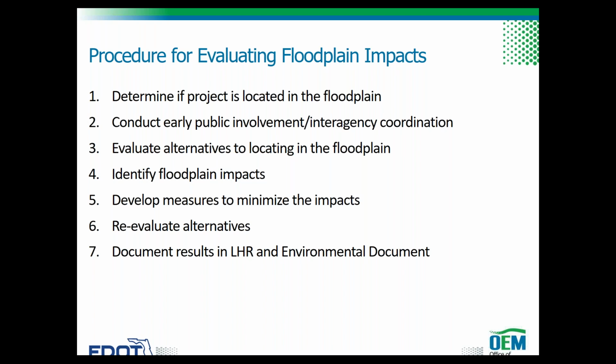If impacts cannot be avoided, develop measures to minimize the impacts and measures to restore and preserve the floodplain as appropriate. Reevaluate alternatives to determine if locating in the project floodplain is still practicable. Document the results in the location hydraulics report and environmental document and present the findings to the public.